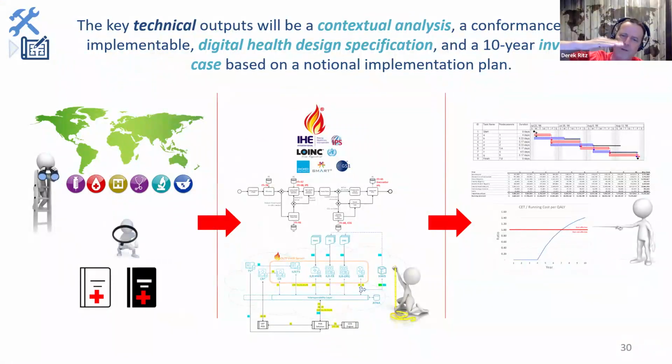to adapt something. And we regularly had to do that in Canada because many of the specifications coming from HL7, for example, were unilingual. They just were not contemplating that you'd have to be able to operate in 2 languages. So in Canada, we very regularly had to adapt because we had to be able to work in French and English. And as a distant third option, we want to develop. So adopt if we can. If we can't adopt, adapt. And if we can't adopt or adapt, as a distant least preferable option, develop.